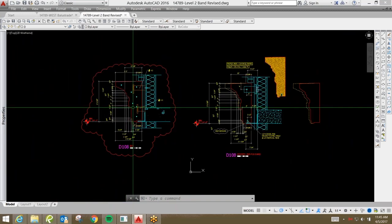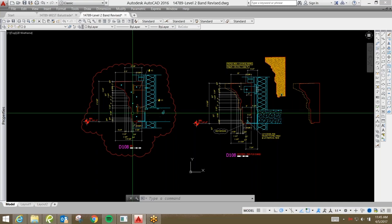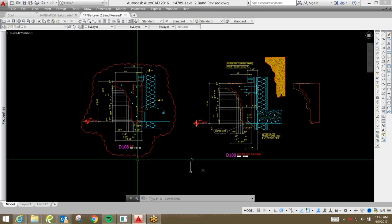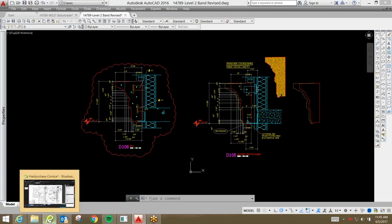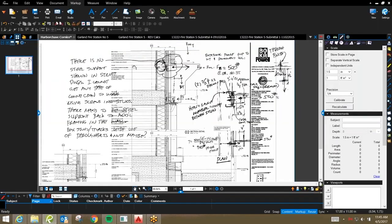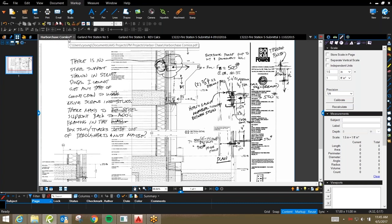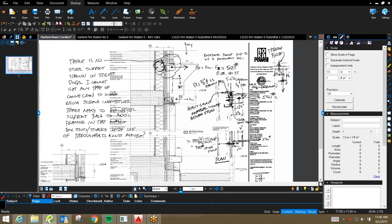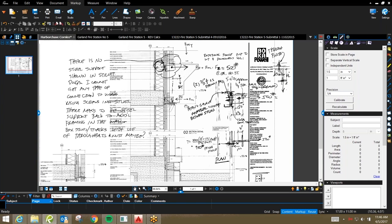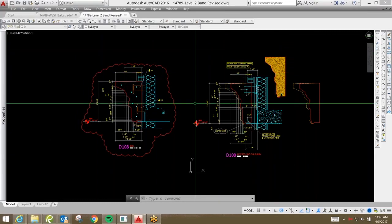Once we submitted this to the engineer, he then sent back marked up drawings for us that, based on his notes, which you see here, the way that this piece wants to rotate is causing an issue with the size of it. So, the recommendation was that we reduce the amount of projection on this profile to allow adequate anchoring.